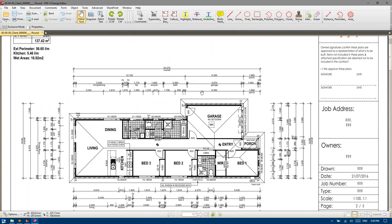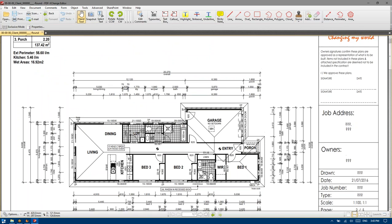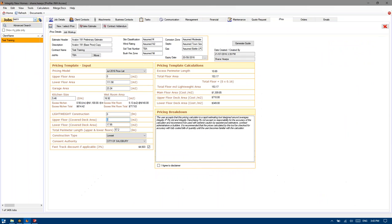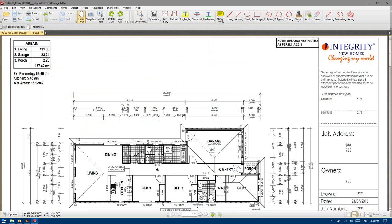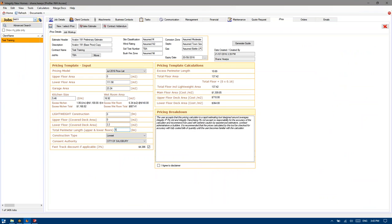The porch is 2.2. It's the only undercover living. The alfresco, if they did choose to do one after the fact, would be nothing more than a patio — it's not undercover space. So we would drop that back to 2.2. And the perimeter: 256.6, which also affects the price.